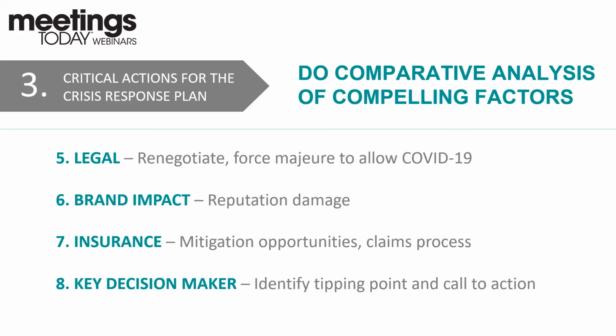And the insurance is also a longer discussion, but again, everyone knows that if you have event cancellation insurance, it doesn't include COVID-19 unless you took it out before there was any inkling of this pandemic. There are going to be more products, I think, available as the insurance industry regroups. So I would have a close relationship now with your insurance provider and start looking at some of the other insurance companies that are out there. And understand, if you have it, what's your claims process? We went through the claims for Sandy, and if we hadn't followed certain mitigation processes in the continuing of this event, then they would not have been able to collect their insurance proceeds, which covered most of their losses.